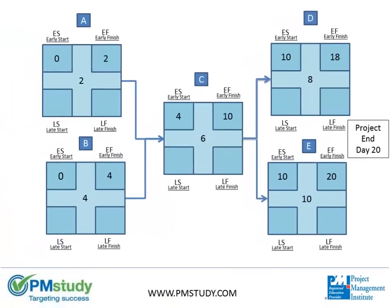Now we will go backwards through the schedule network diagram to determine the latest each task can start and end without increasing the project duration or impacting the successor tasks.